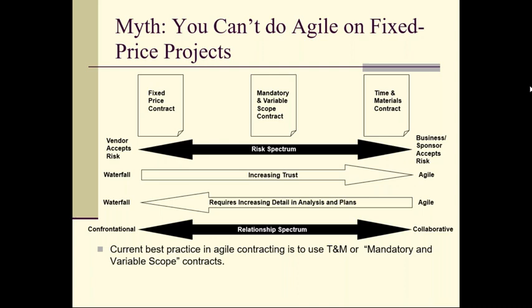And realistically, not everything goes wrong all the time. So probably the vendor priced in more contingency than we probably needed. So I ended up almost automatically overpaying for the project by doing a fixed price contract. It's a trade-off. I'm guaranteeing a higher price than I needed to pay, but with the elimination of the risk of me going over budget. That higher number will be guaranteed and locked in stone.